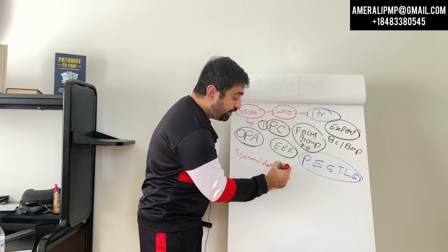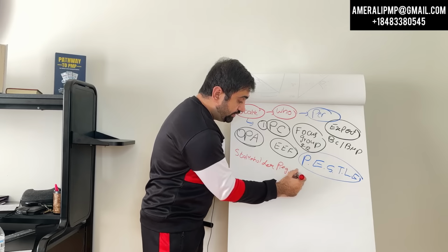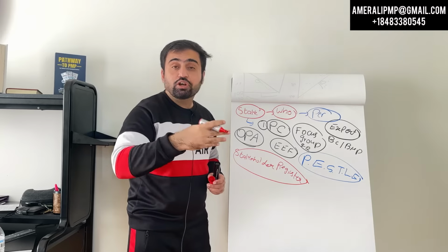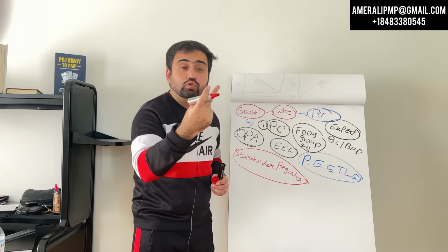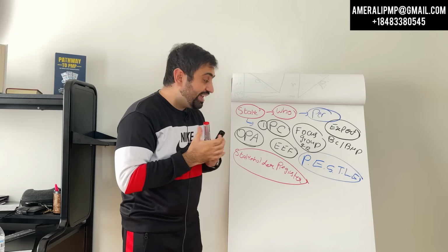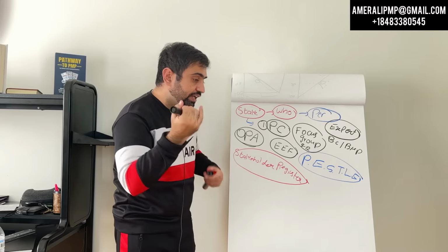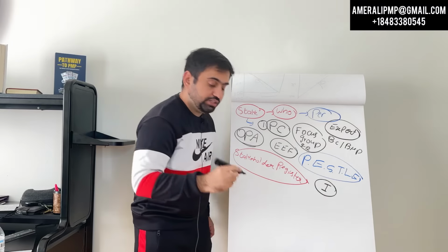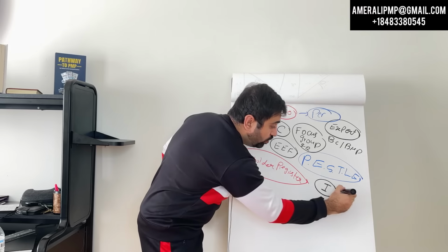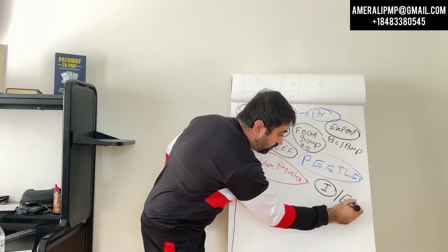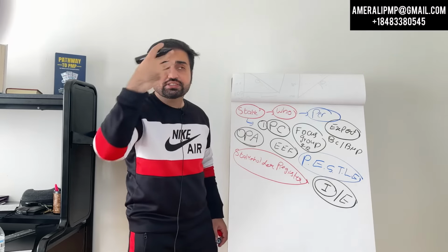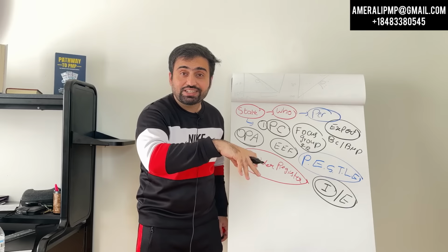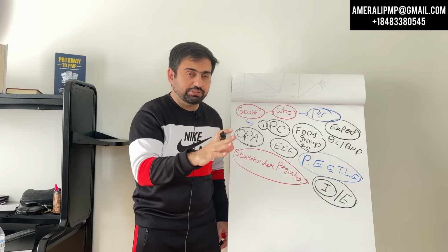Now we have put them in. What we are going to do is analysis. Analysis consists of two parts. The first will be categorization. I'm going to categorize the stakeholders who are internal to the organization, and who are external to the organization. So who are the suppliers, my client, who is actually my boss within the organization. So that helps us immediately.